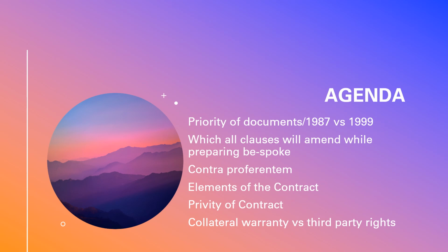Okay, now Engineer is this entity, be it WSP, AECOM, whoever. Main Contractor, this entity, Alnabuda, Trojan or someone. Subcontractor is the MEP contractor, Alamco, Speakon, anyone. So when you go to the next clause, then you can mention that instruction can be given by the Employer on this condition. Instruction can be given by the Engineer on this condition.